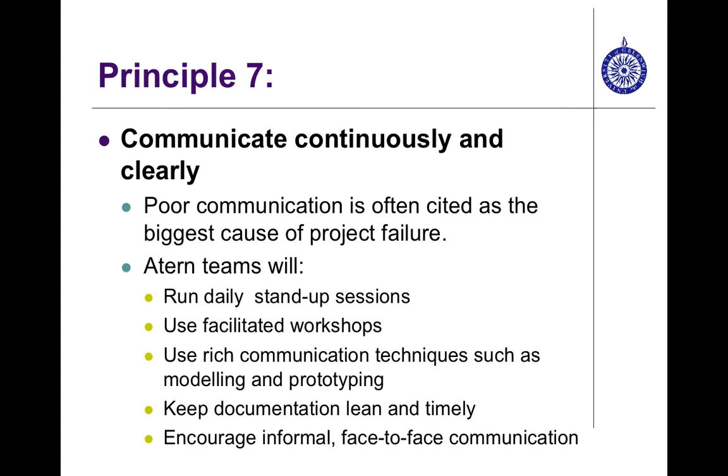For example, plans and progress must be visible to everyone in the team, to all people or stakeholders concerned with the project, and measure progress through focus on delivery of products rather than completed activities. Again, in the SDM item, it's about product activities.